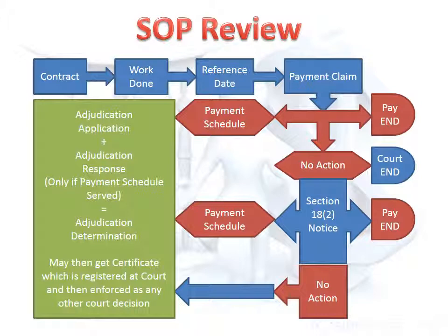The client has 5 business days to lodge an adjudication response from the receipt of the adjudication application, or 2 days from receipt of the adjudicator's notice of acceptance, whichever is the latter. If an adjudication response includes reasons for withholding payment not in the payment schedule, then the claimant has 2 days to further respond.